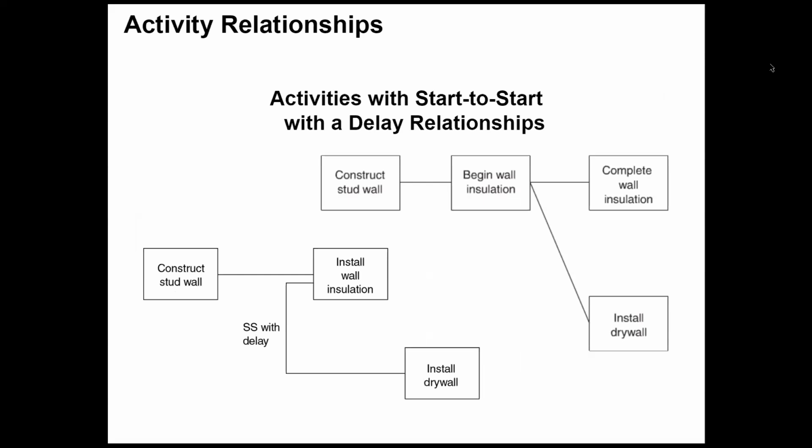So you can also use a start with a delay. You install your wall installation and then you install your drywalls. That means you're starting from fixed section A and then you do section B, right? For the wall installation. But when you're doing the drywall, when your section A is finished, then you can do section A and then move to section B. So same thing.